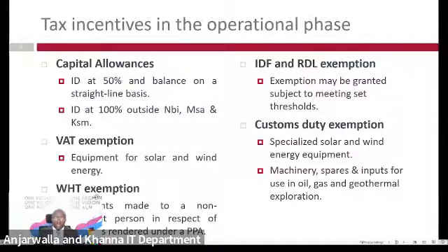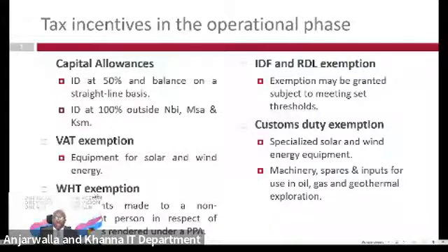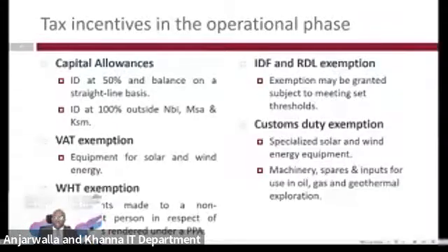There are various complications which will usually arise. In some cases, you need to take out customs bonds to allow the goods to be cleared prior to duties being paid, because there's usually a bit of a delay in getting exemptions from the National Treasury and the KRA, and having this implemented. But at the same time, goods may have arrived at the port. So there are mechanisms, and we help our clients to procure some of these bonds and ensure that the goods are released, even as we try and ensure that the exemptions are granted.